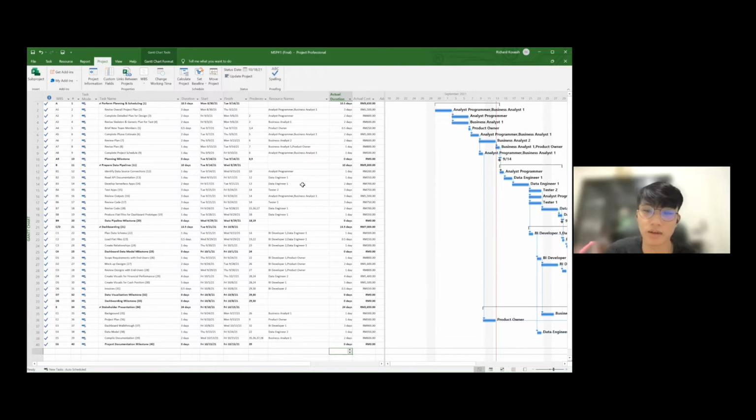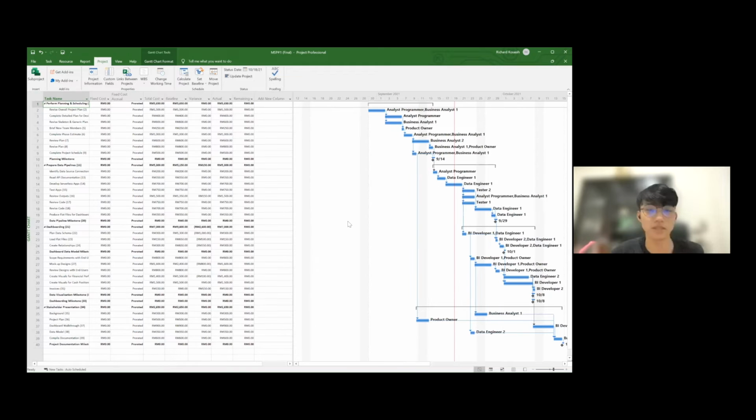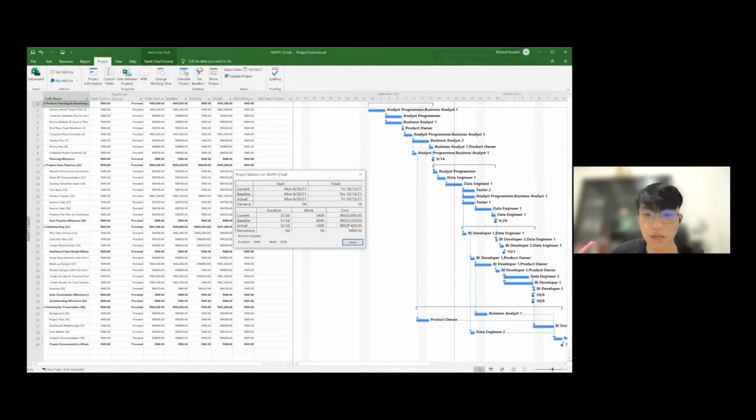Just to add a little bit more, as a comparison with the actual durations, we came up with our own actual durations, the actual time we took to complete each task. If you take a look at the cost table, here our baseline duration is 31.5 days or 604 hours, and our budget is around 23,050 ringgit.